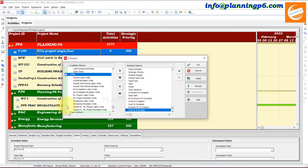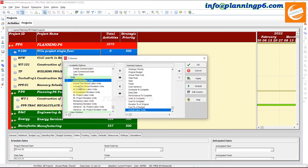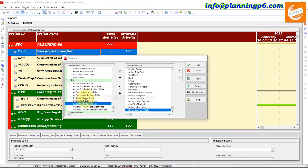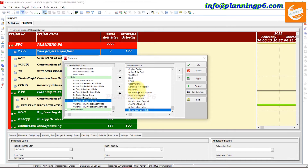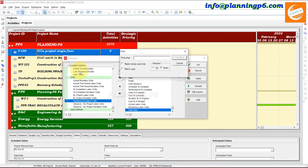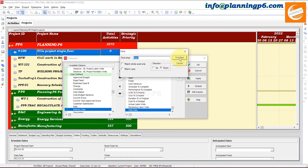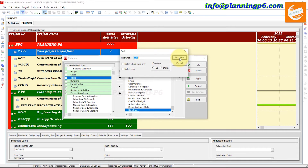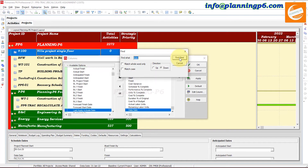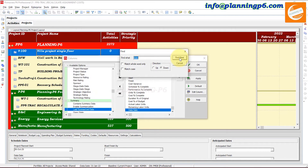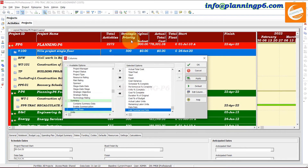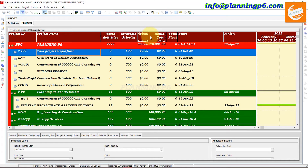From the Summary section you can add Actual Labor Units and Remaining Labor Units. We will move Data Date to the end. Then we will search for and add Last Summarization Date. Close this tab and apply — all columns have now been applied.